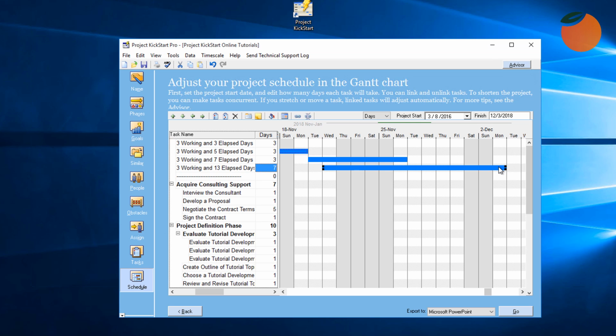This brings us to the number one benefit of the Gantt chart, the ability to replan. This task will take too long according to this, but the Gantt chart has provided an insight for action. Perhaps a full-time experienced person needs to be assigned to this task. Maybe requirements of earlier tasks can be scaled back so this task can start and finish before the holiday. Maybe a second resource who will work on the Friday and Saturday after Thanksgiving can help the intern.